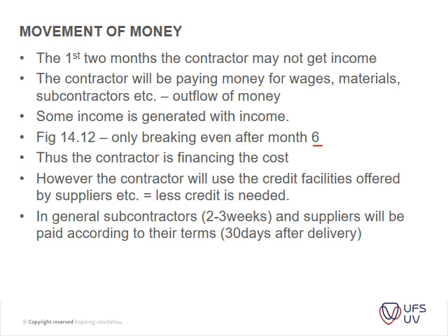And it really depends on how it works. In South Africa, it's very much a system of get paid when you are paid, which the new contracts are trying to alleviate, because some of the subcontractors did suffer quite a lot through this process.